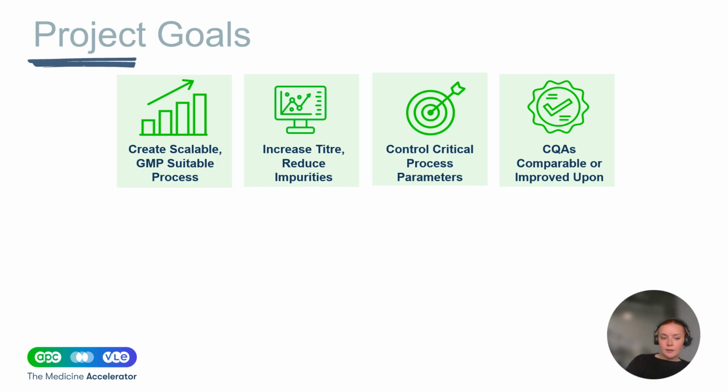So how were we going to do this? Through our CMC strategy, so we use CMC maps and CMC milestones, which are infused into our programs at kickoff. And the client, APC, and VLE are all responsible for their own milestones, but it's a good way to keep everybody on track in terms of when we know that for this date we need to have a certain work package done with a report or some type of deliverable on the end of the project because of this very important clinical phase or filing that the client's going to do. We used our online knowledge management platform, iAchieve, as our one source of truth.